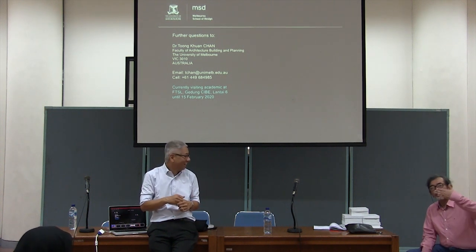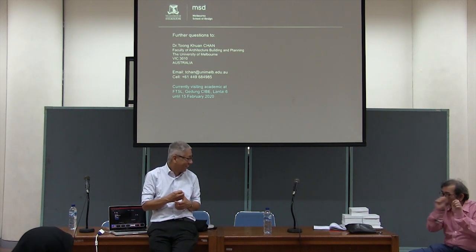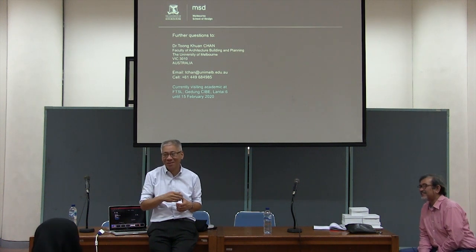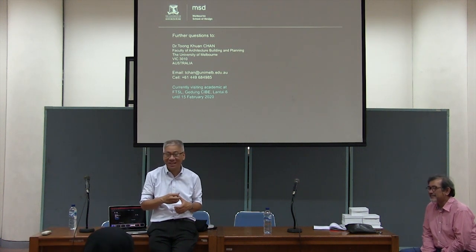Long lead item, how long do we wait? So you have to make your schedule a long lead item. Oh, okay. Like 1 month. Oh, ours is tomorrow. Ours is tomorrow. If you need a crane tomorrow, the crane will come. You just have to pay. Or it will not happen. Okay. See, you have different issues. So I'm hoping that you guys become better architects, all right?